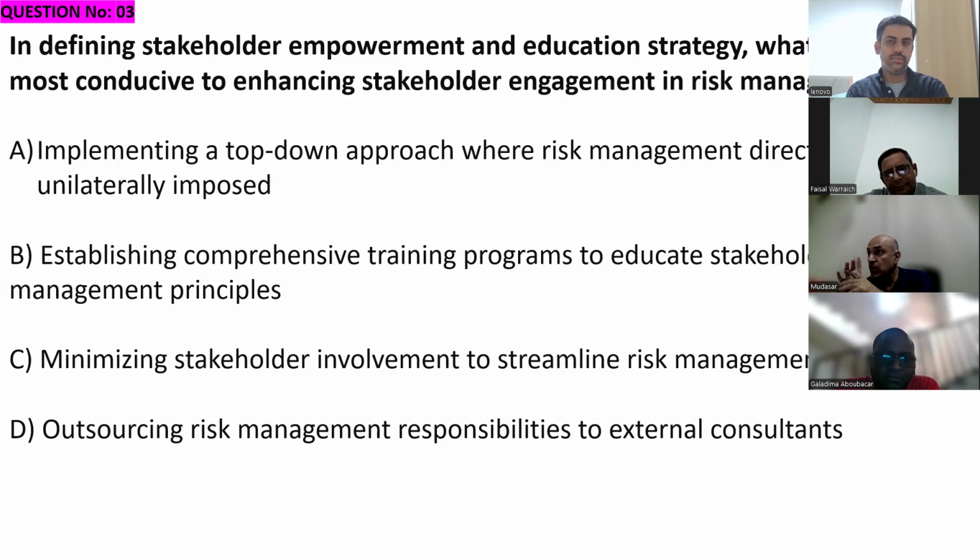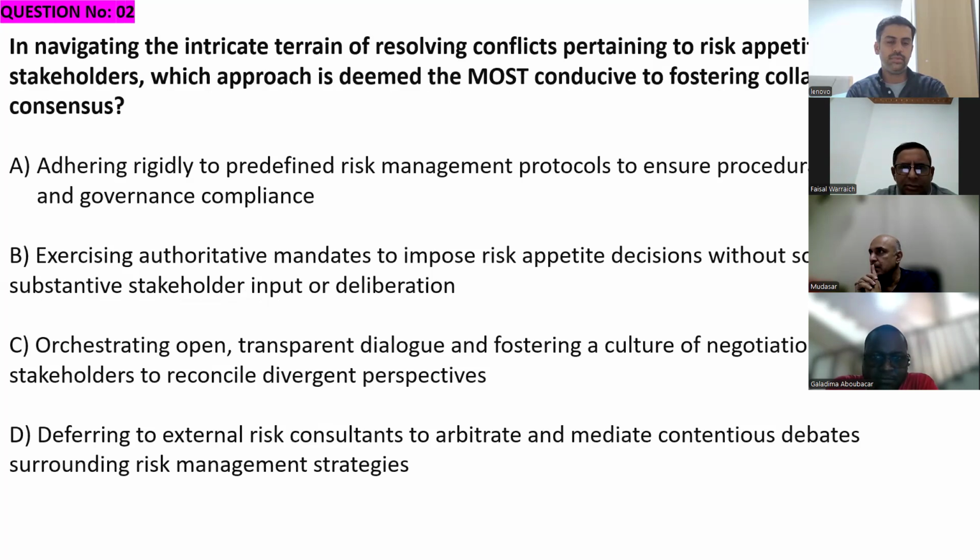Yes, exactly. What I'm trying to say is this does not depend upon the stakeholders' risk appetite. This is dependent on the organizational thing. So why can option A not be the answer in the last question? First of all, organizational appetite also comes from organizational executives, relevant stakeholders. But if we are developing the appetite or threshold for the project, then we take the input from the project stakeholders.